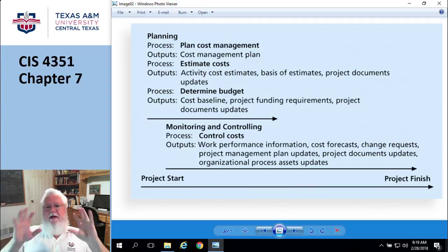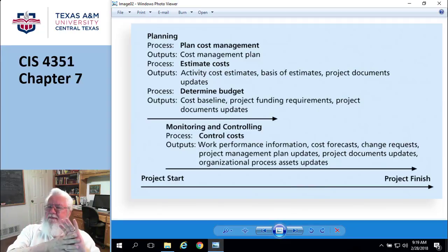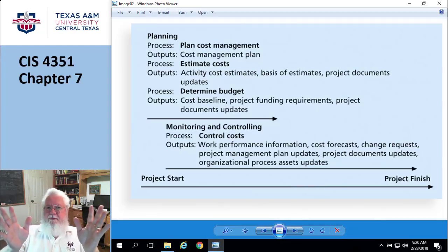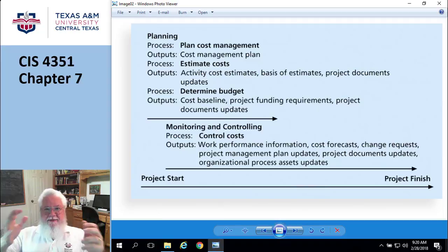Okay. Having said that, here's the funny part. Humans have this bizarre concept of, well, I've already spent $100,000 on this thing, and now I have to decide on whether or not I want to continue the project. Well, I've already spent $100,000. I might as well get something out of it. That's the wrong thinking. It's human nature to think that. By the way, the people in the slot machine business love this, right? I've already put in $100, so I need to keep on going. Well, that's the same idea. You're not getting that money back.